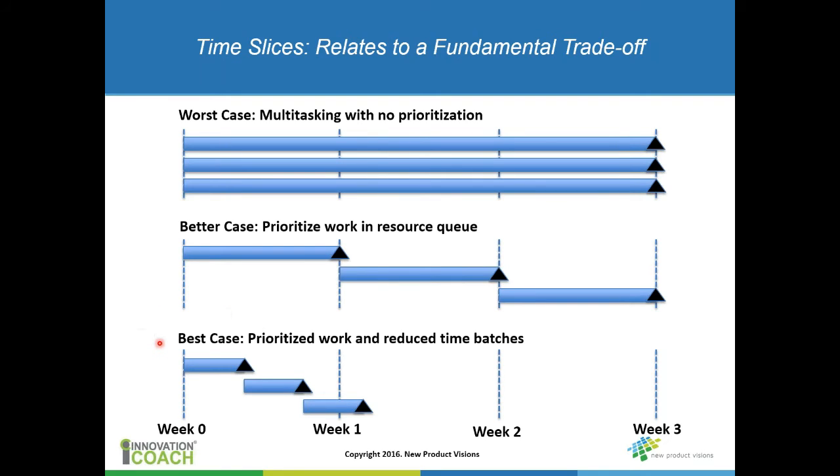But there is another way, kind of a best case, where the content provider here, the person that's working on these three tasks, is working with the project manager on these three different tasks, and they come up with a way to synchronize the work, reduce the time batches of the tasks that have to be done, break it up into some logical chunks, and do it purposefully so that you're not just multitasking, but you're breaking things up into chunks where you can spend a couple days on this task and then hand that off to somebody else and then go on to this task.